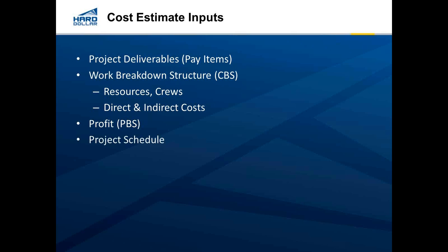Now, there's some other factors that are going to influence the project as well. The project schedule, while it is often calculated separately from the estimate, the one affects the other. So if I am scheduling something out and we need to do it in less time, well, then the decision needs to be made. How are we going to accomplish that, and how much will it cost us? So the one affects the other, and they really need to be looked at in tandem, and the two departments need to work together to make sure that there's a clear understanding of the two constraints, cost and time.